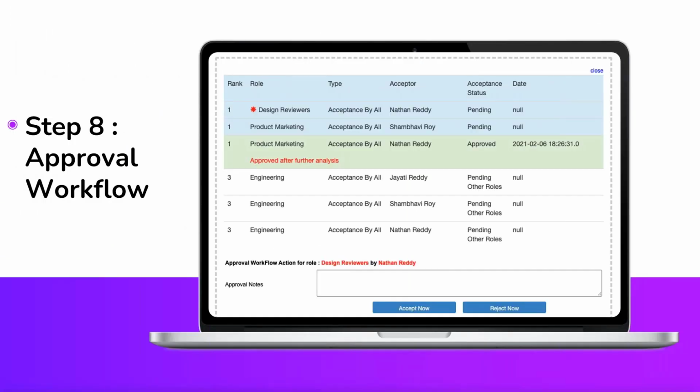We talked about approval workflow. So for example, when your requirements change, that change needs to be approved by the right authorized role members. There's no predefined hard and fast rule as to who defines or who approves those role requirements. So the system should give you the flexibility to define roles, add members, and set those roles in a sequence so they can actually go through an approval process.